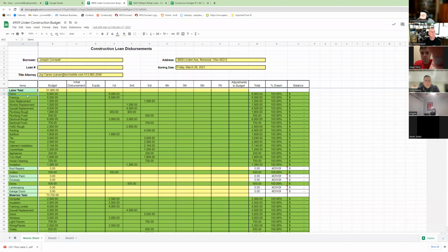So for demo, because I use a sub crew, which is probably more similar to what everyone watching this would do, I'm going to have my sub crew come through, ideally during my due diligence phase of a project, meaning before I close on it, and have them give me a rough number. Now, I'm not expecting this number to be exact, but if I'm budgeting 6,000, then I want to make sure it's not 12,000, right? So I'm going to ask them to give me a relatively ballpark number on a demo.